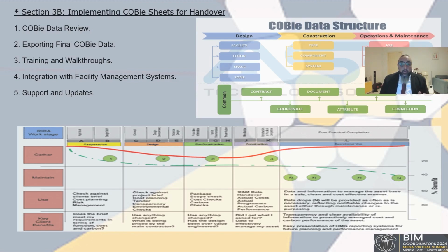Then training and walkthrough: provide a training session and walkthrough for the facility management team to familiarize them with the COBie sheet and how to access and use the information. This can include navigating the spreadsheet, understanding the data provided, and integrating it with their maintenance and asset management system.